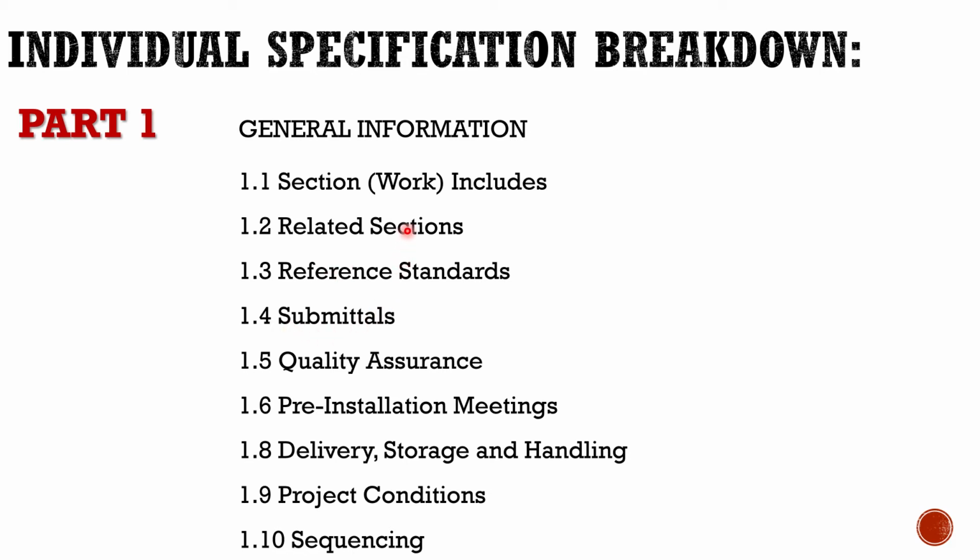So this is the traditional relationship. Remember, it's design, specifications are made, and then it goes out for bid. Now in design-build, this is being developed at the same time. So there's a lot of communication back and forth, and a lot of these unknowns kind of disappear.